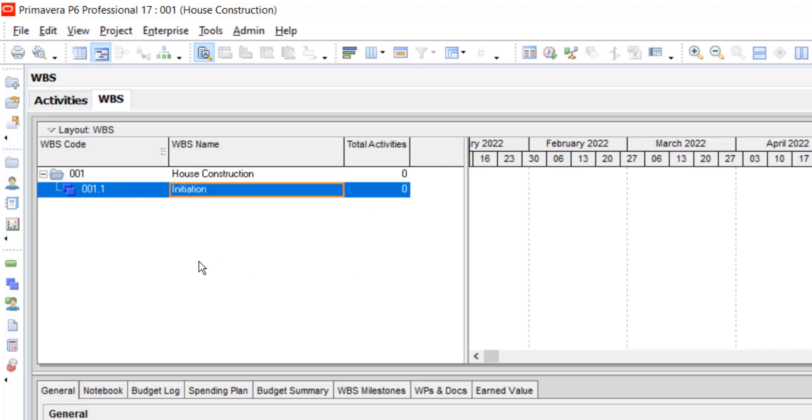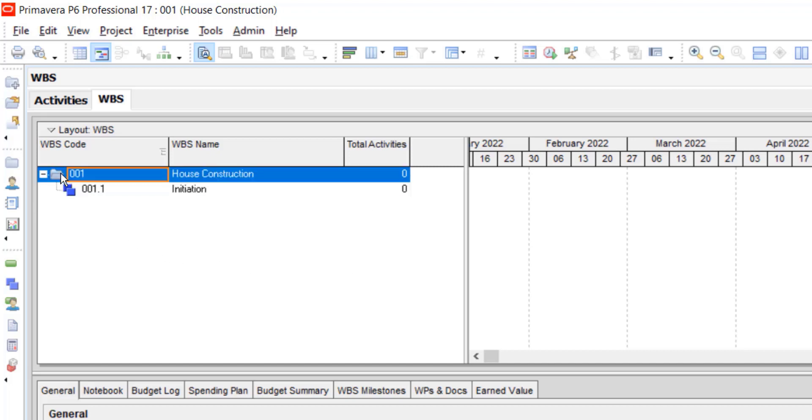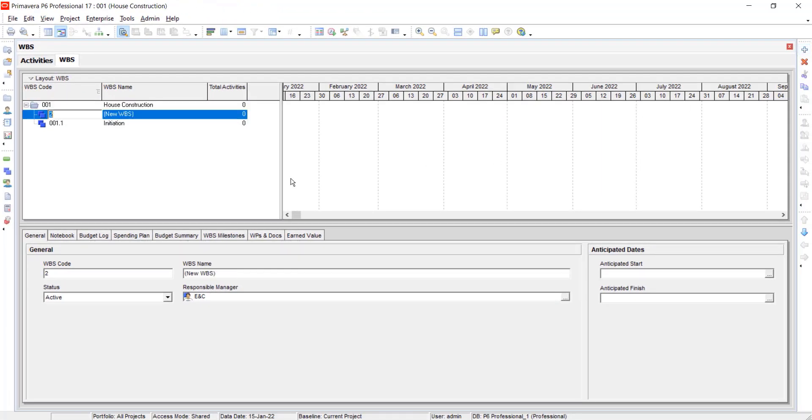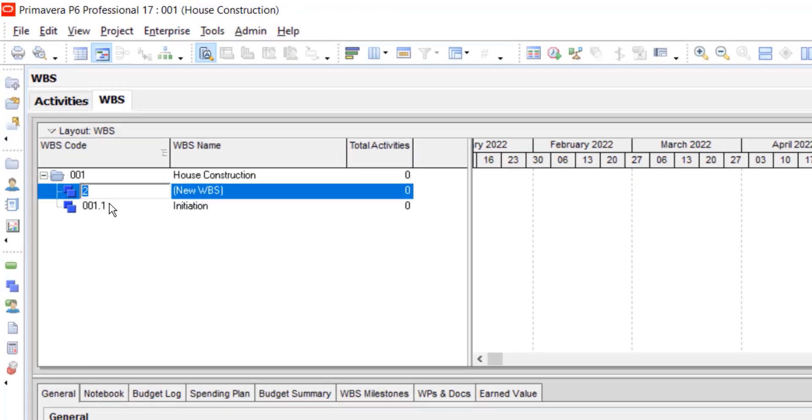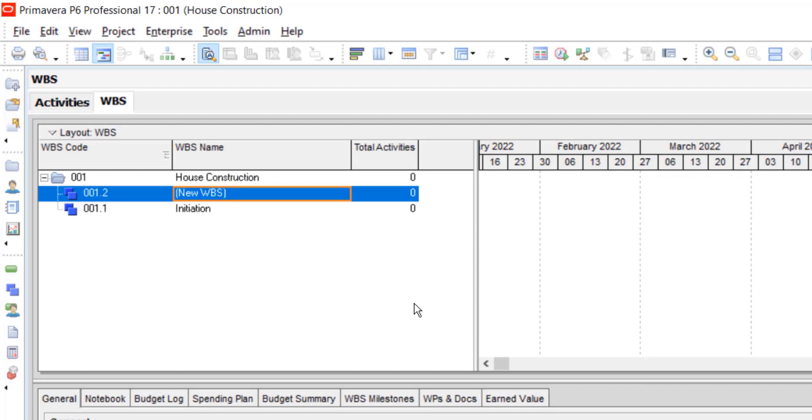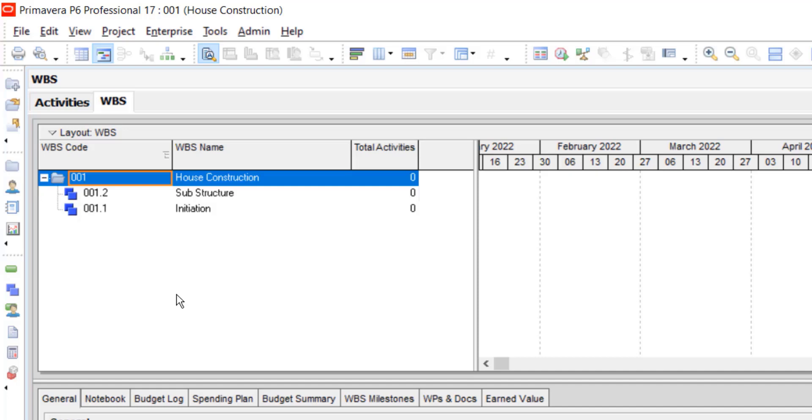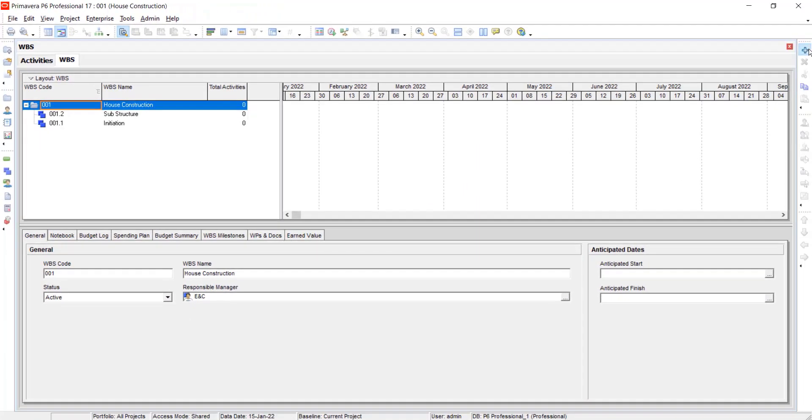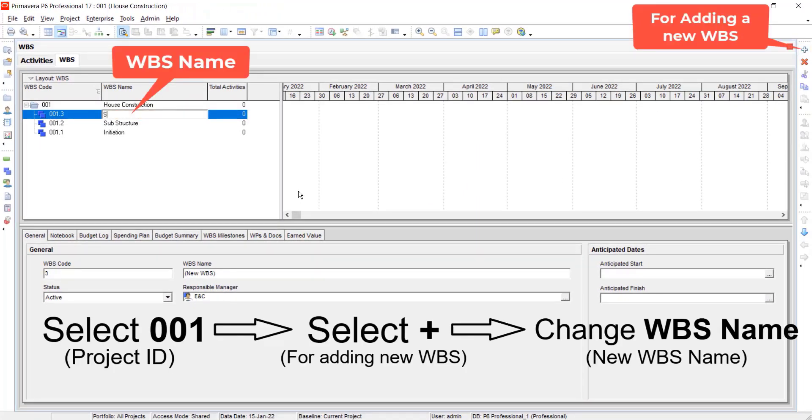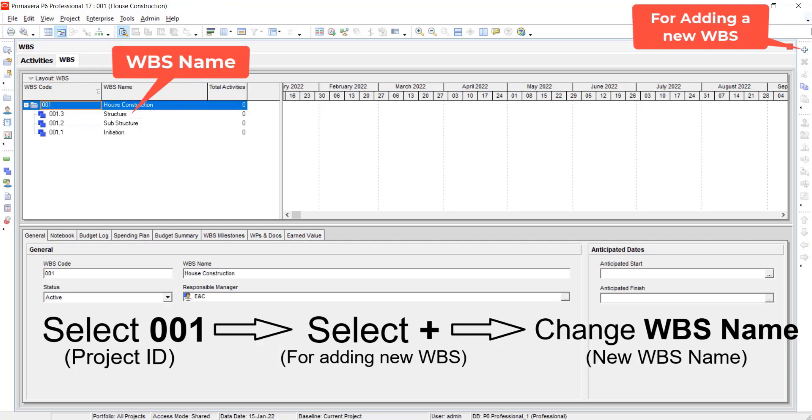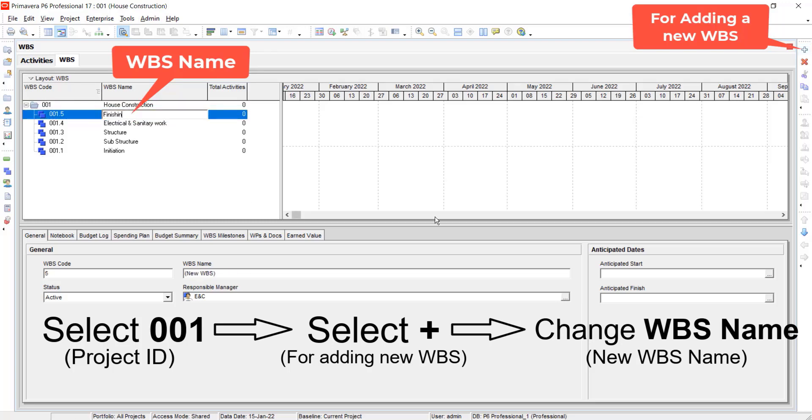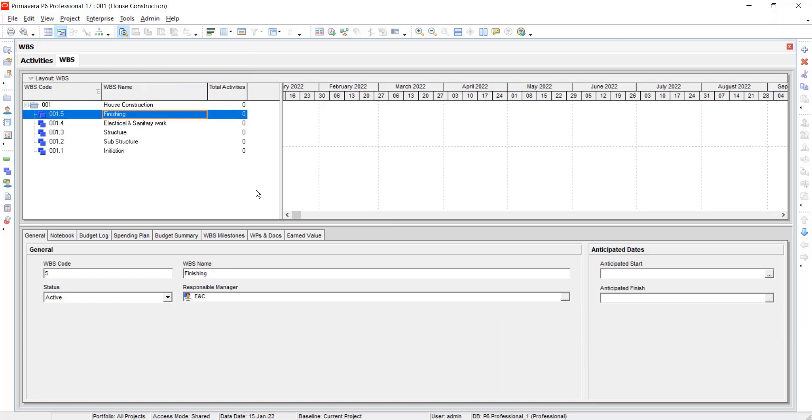To create a new WBS, first click on this, then add. Do not change the WBS code, give it a name. Repeat the same method for each phase. Once all the WBS have been created, now we will assign activities to each WBS.